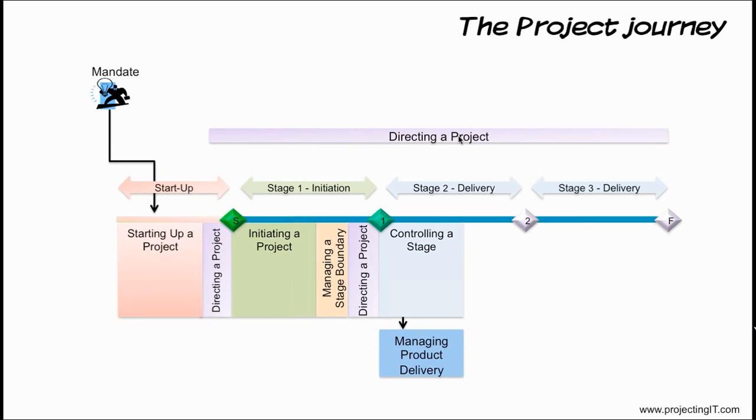The team manager is expected to keep the project manager informed about the status of work package on a regular basis. This is achieved using checkpoint report, which is like a status report that is sent on an agreed basis. If the work package tolerances are forecast to exceed, the team manager raises an issue to the project manager to alert the project manager about a possible deviation, and the project manager will advise what to do next to the team manager.